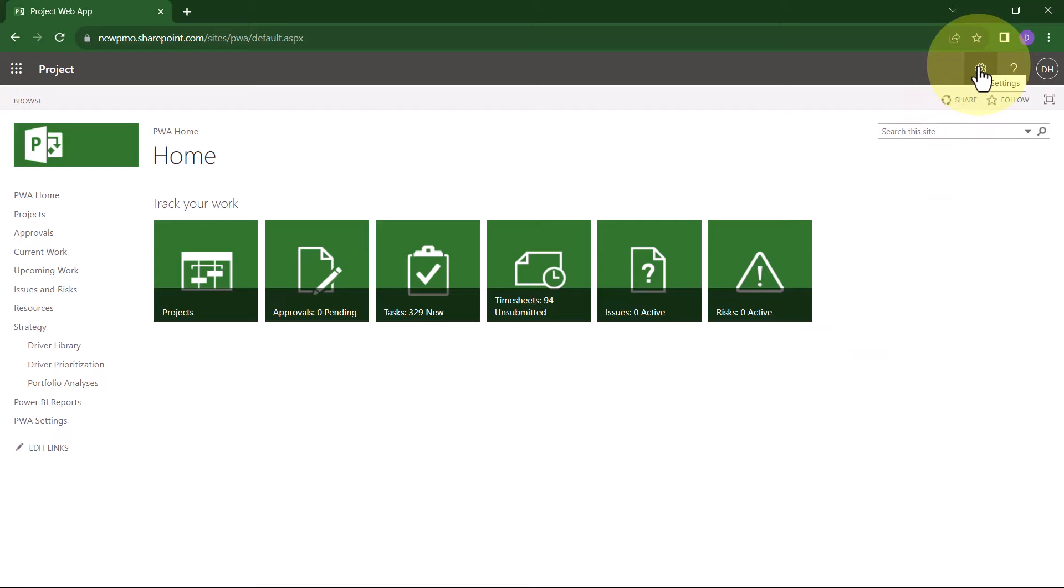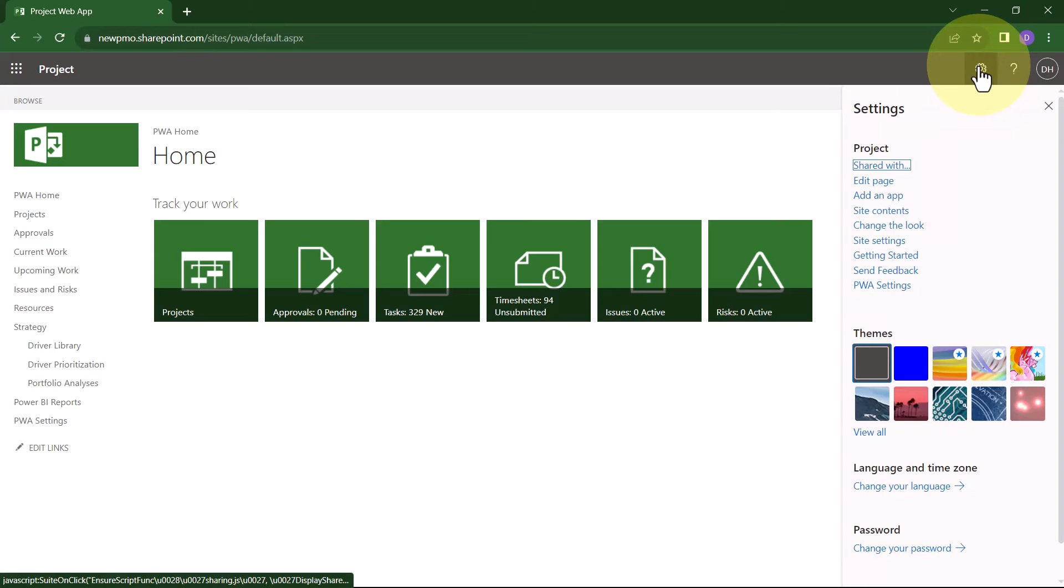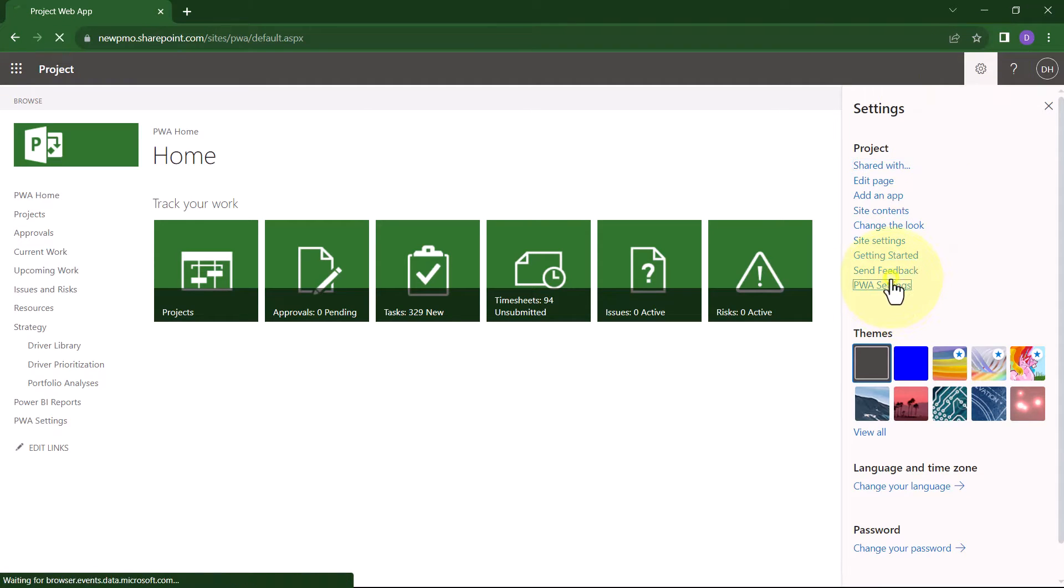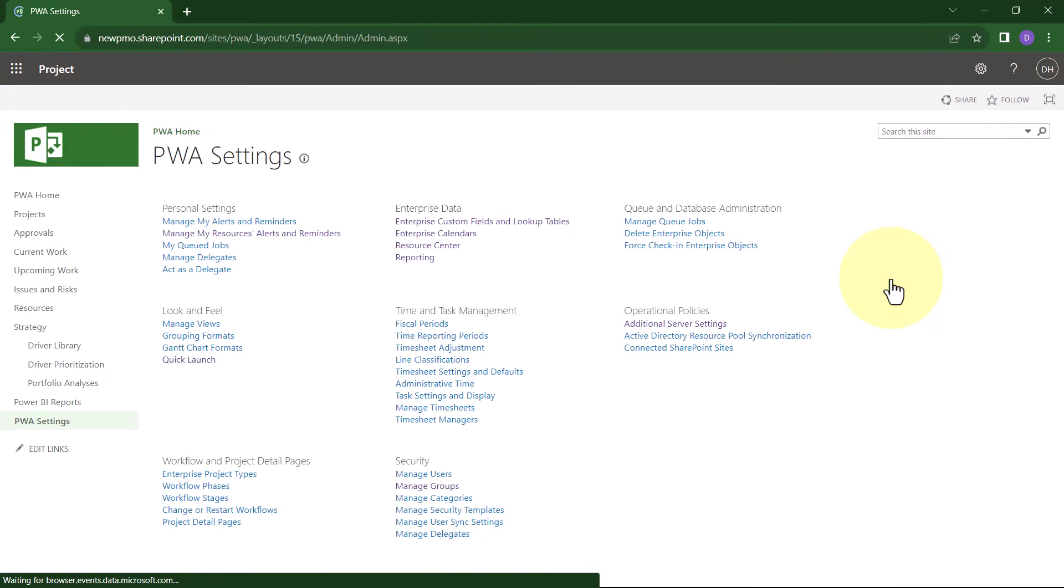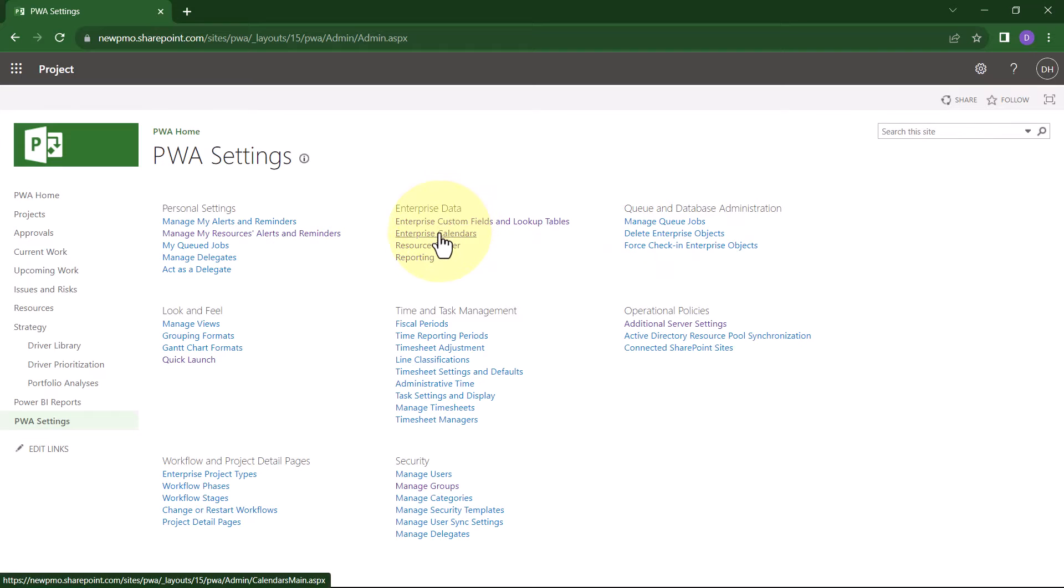In the upper right corner of the screen, click the Settings menu button. It looks like a gear wheel. Then choose PWA Settings on the menu. On the PWA Settings page, go to the Enterprise Data section and click Enterprise Calendars.